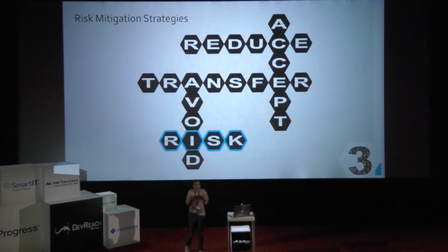But there is a price. Your contractors will be willing to take care of your risk, but for adequate reward. So you have to pay that. What you need to do is come up with the cost of the risk, what is the cost you will pay, and compare the two. And you need to make sure that stakeholders are aware of it, and the contractors are aware of this comparison, and only then you have an economically justified situation where you can use this strategy.